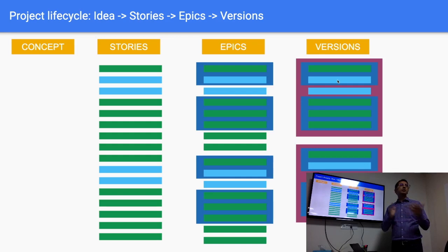And these are typically also synonymous to releases. So we say we're going to have our MVP, a minimum viable product, which will comprise a set of 4 epics and a few other stories and tasks maybe, and this is what we'll call our MVP. Now, as we go along, we might reduce some stories, add a few stories, but effectively that version remains the same. So these few stories and epics might come out of this or go into this, but we start creating versions of what we need to release as chunks, and these are typically to the live sites, right? So, is this clear with this concept?